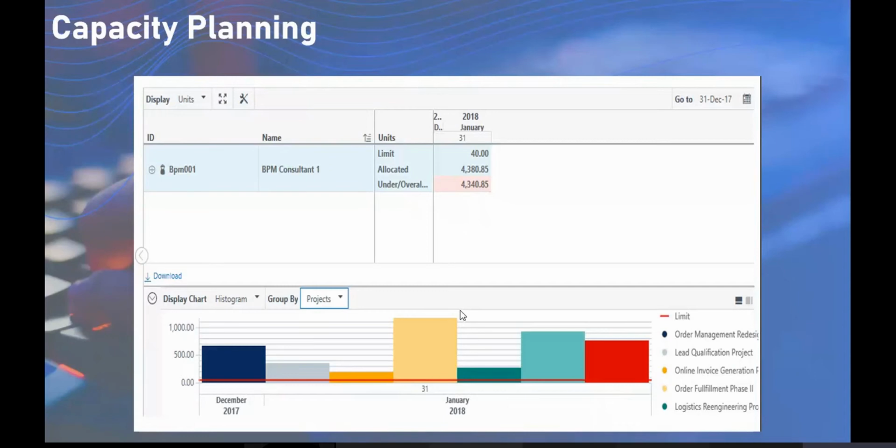In this case, how am I going to deploy throughout a 1-year project, from January to December? Every month, I'm going to deploy 20 laborers, or 50 laborers, or 50 helpers, however many engineers. This can be tracked with the help of capacity planning, that is, role-based analysis is possible in the web solution.